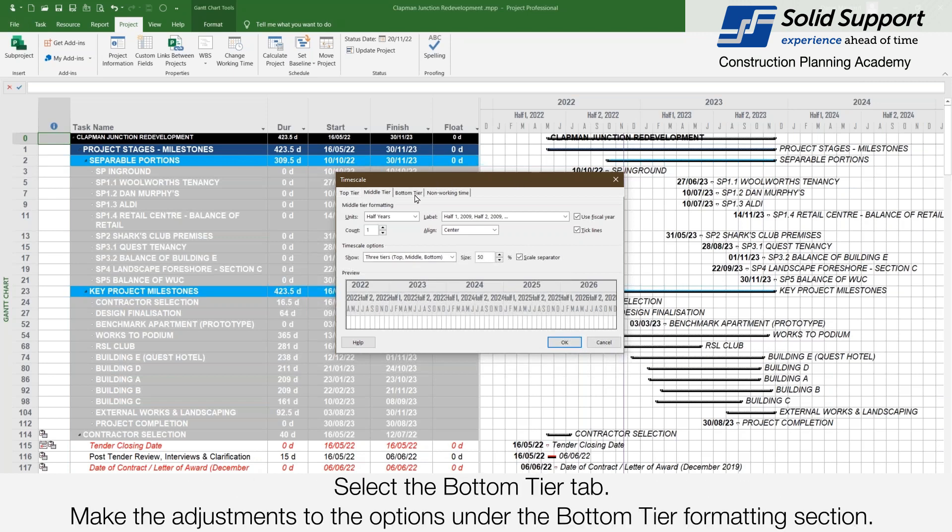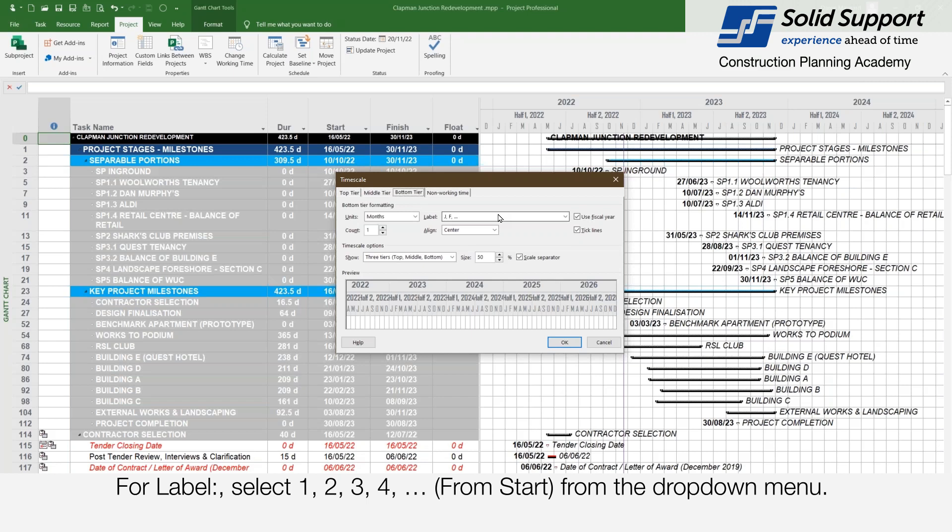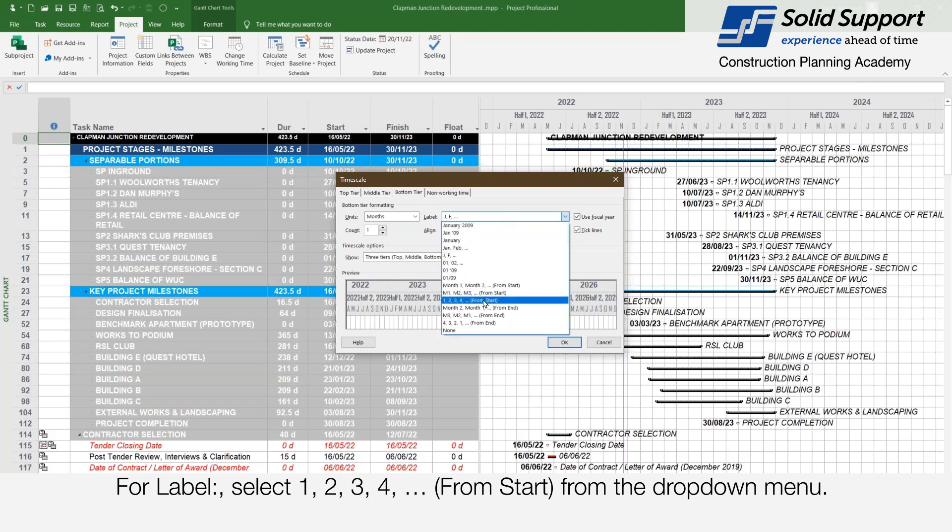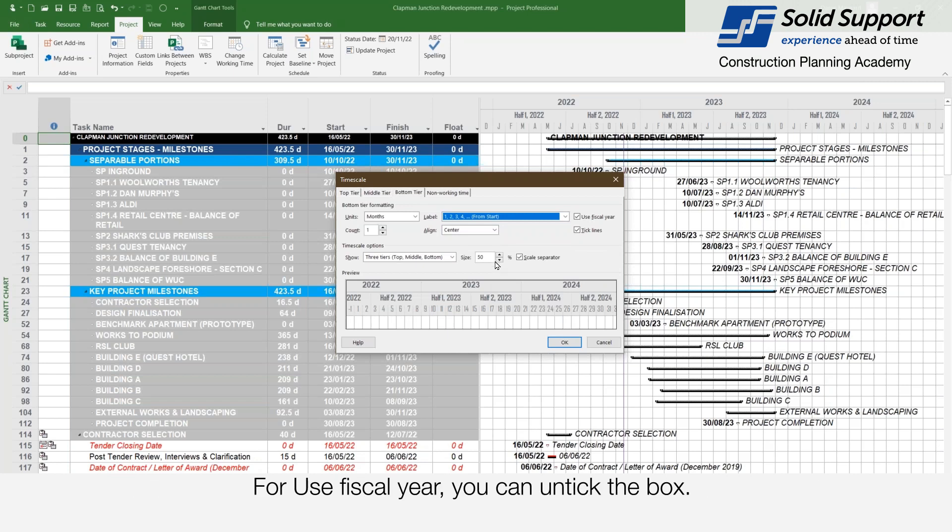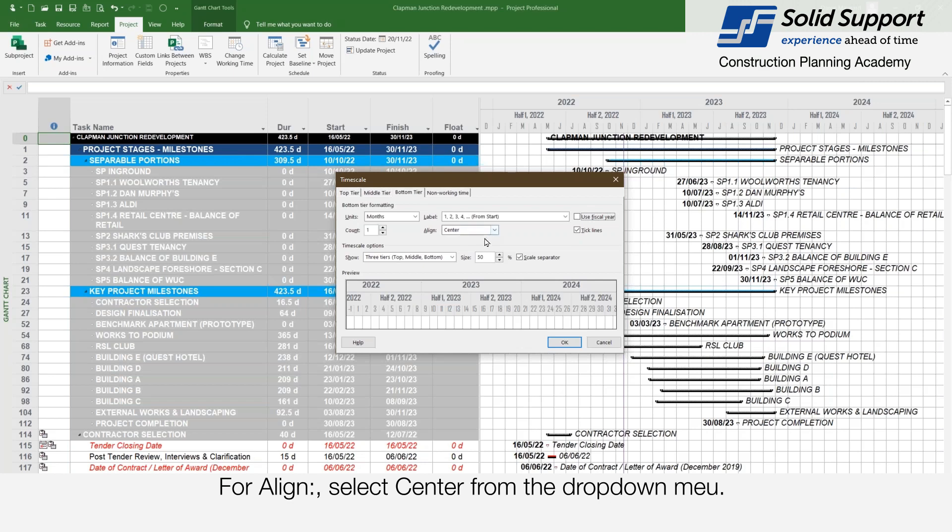Select the bottom tier tab. Make adjustments to the options on the bottom tier formatting section. For units select months from the drop down menu. For the labels select 1, 2, 3, 4... from start. For use fiscal year you can untick the box. For count enter 1 in the box and for align select center from the drop down menu.